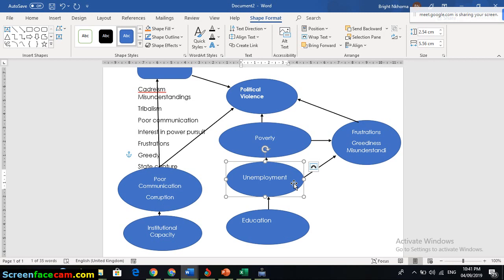Then at the same point, we are going to frame the objectives from the factors that we've listed in the conceptual framework. Even as we are setting the expectations, we can set them from here. At least after 1 year, we must be able to say that unemployment level should reduce from 14% to, I mean, from 14% to 7%. Then in the final year, at least at the end of this program, unemployment should remain at 2% only. So we have addressed all the things that are supposed to be addressed under the conceptual framework.